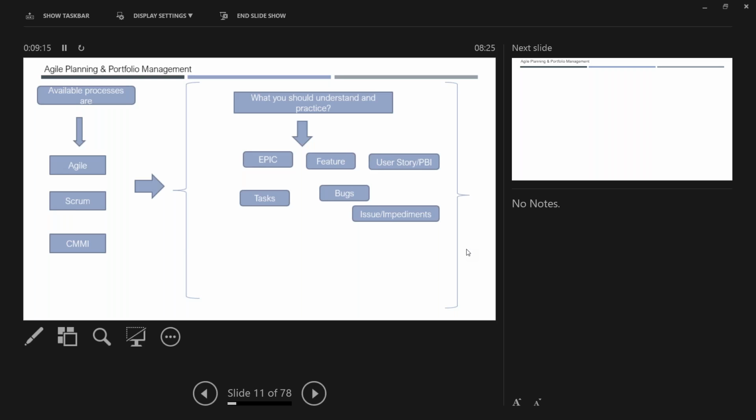If I have to say all the user stories have been completed, then that means all the tasks under each and every user story should have been completed. So this is a traversing path actually. If, let us say, some of the tasks are not completed, and I'm going with only a few tasks to the deployment, then my tasks are completed, but my user story will still be in progress, because all my tasks are not completed. If that is the case, then your feature will still be in progress. So if you have to make your parent completed, then all the child items should have been completed.